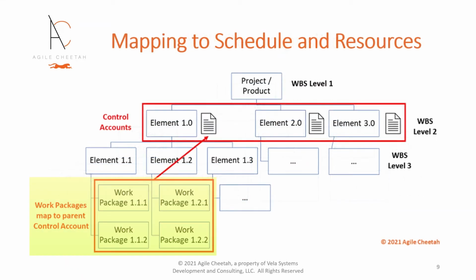Decomposing across elements just enough to help project scope definition without overspecifying the project or solution, while accounting for the entirety of the project scope, is an art honed by experience. At the lowest level of each branch of the WBS hierarchy are work packages.